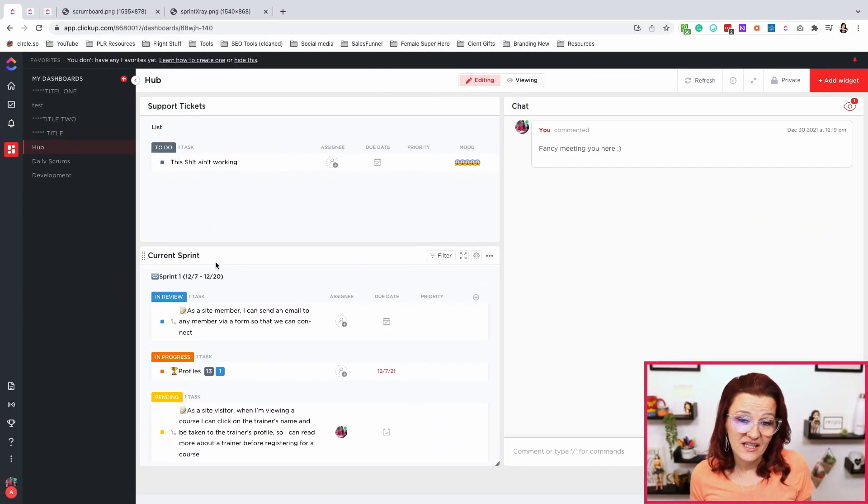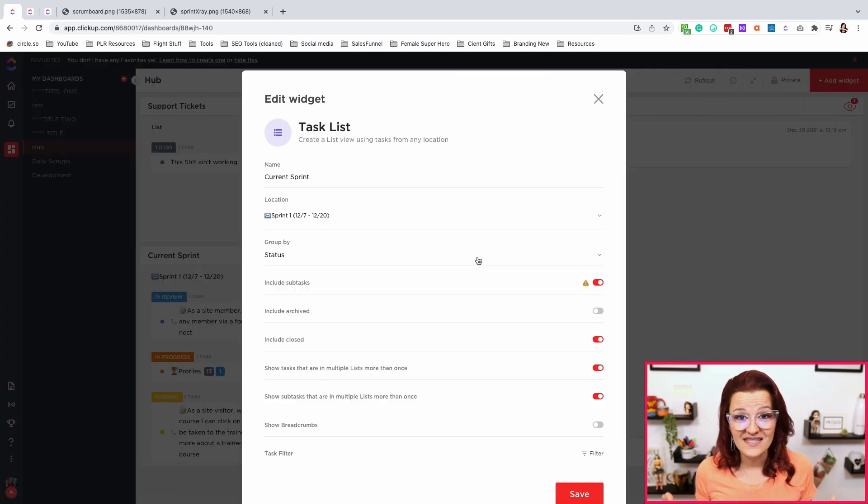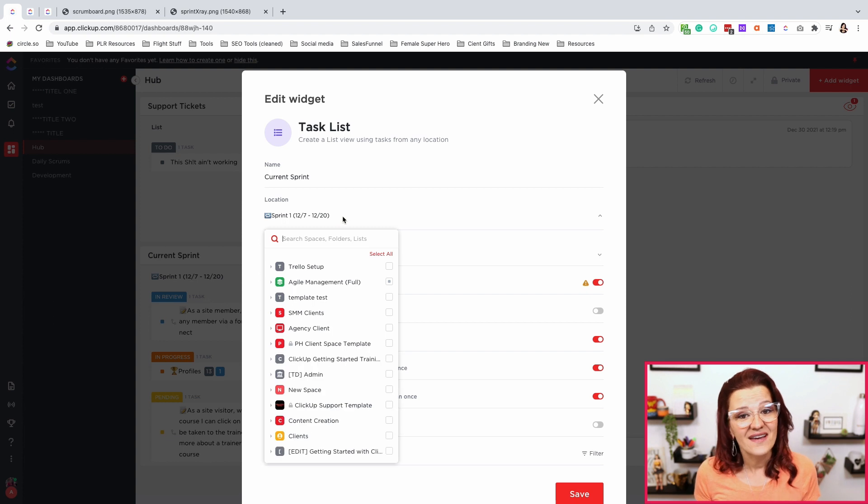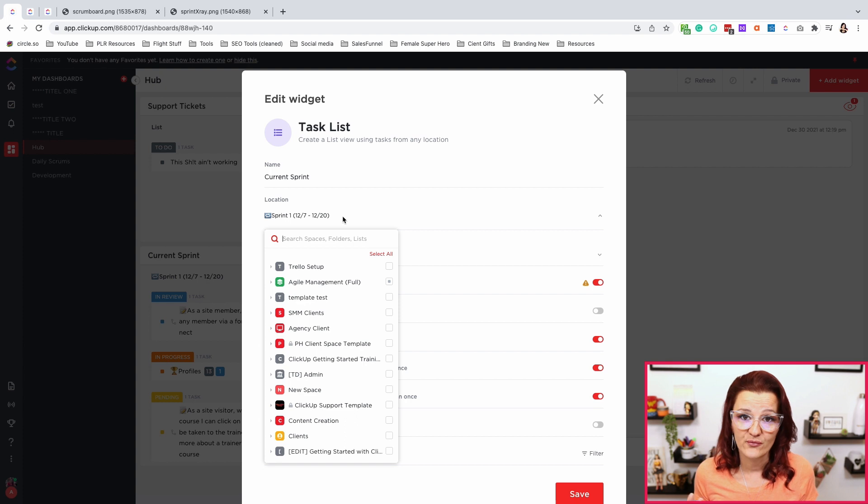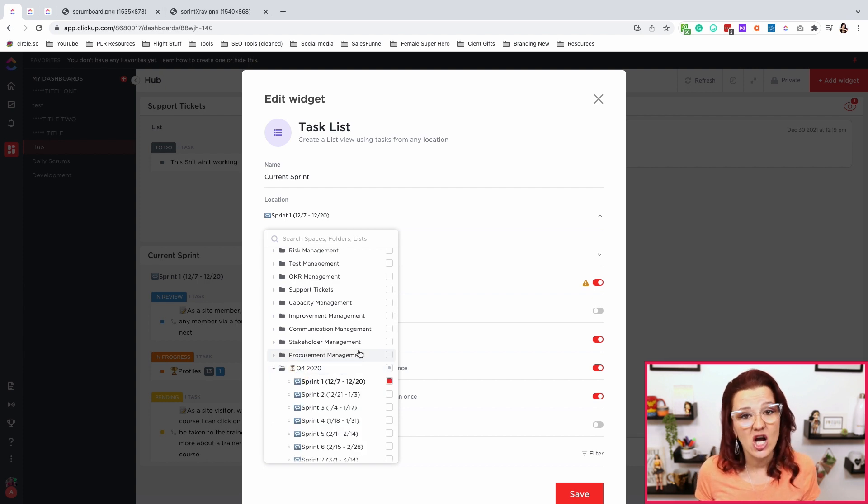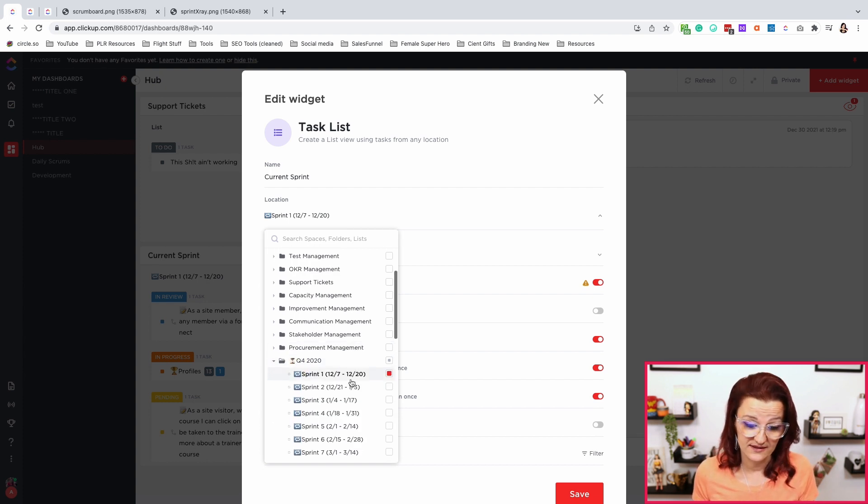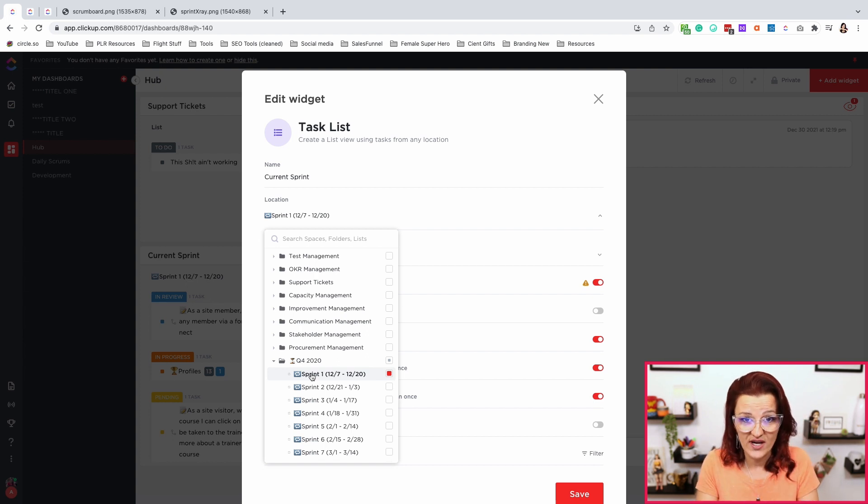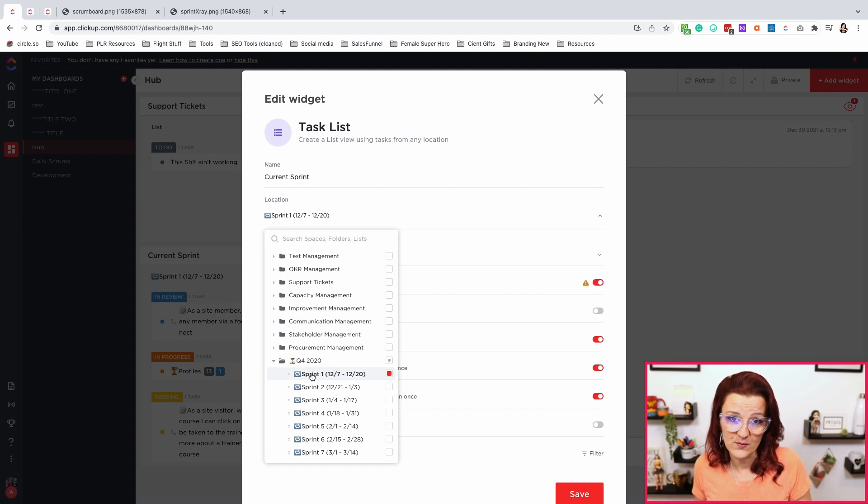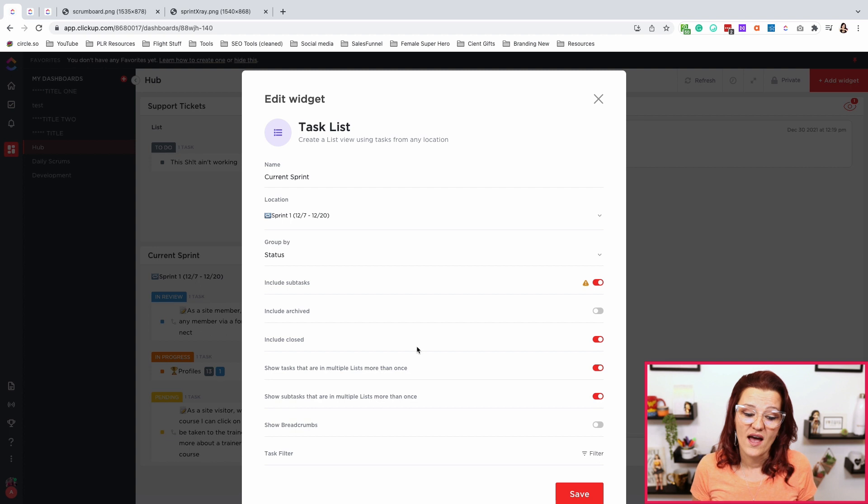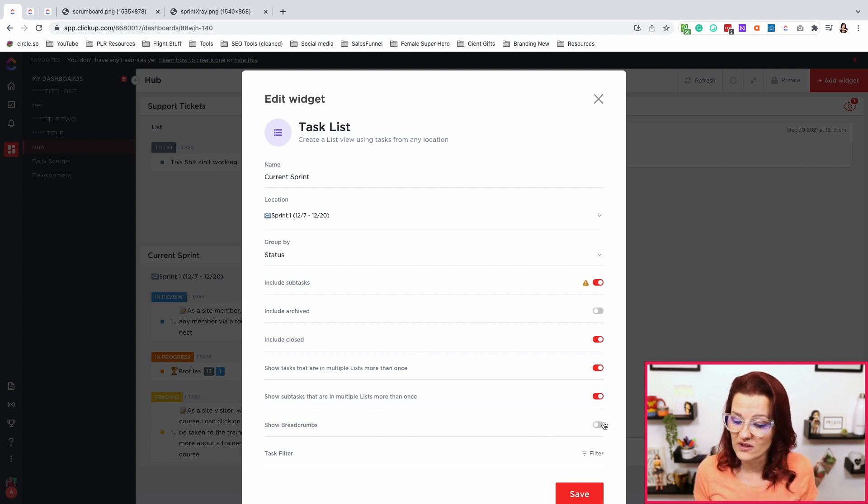This third widget is going to need some updating while you are going through sprints. So let's look at the settings. What did we do here? This again is a standard task list widget, nothing fancy about it. We call it current sprint. And this is where your management tasks come in, where you maybe should set up a recurring task that reminds you to switch your sprint list. Because this is the current sprint, as you can see, the dates are off. This is my sandbox. You want to choose your current dates with this being your current sprint. And you need to go in and switch from your past sprint to the current sprint when you are going from one sprint to the other. As simple as that. Other than that, make sure you include your closed tasks, because we do want to see what's gotten done, as well as show your tasks and subtasks in multiple lists. As we've talked about, subtasks in multiple lists is a big feature being used in agile management right here in ClickUp. And that's our first dashboard.